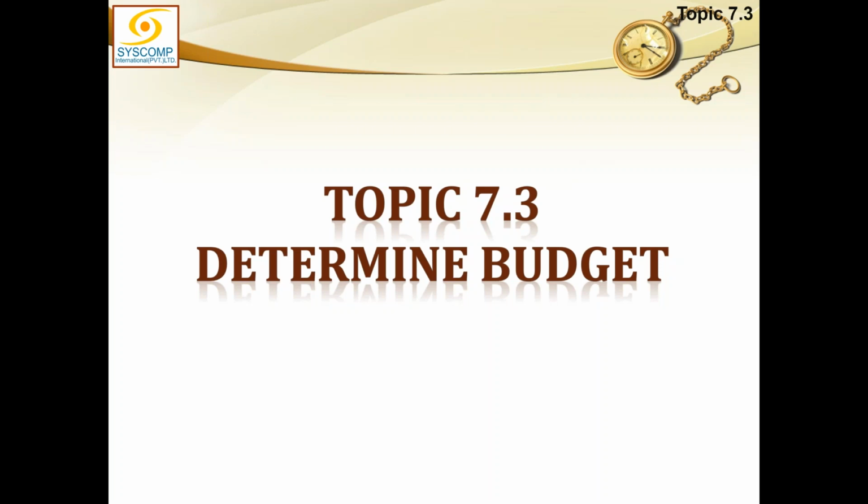We said why? So their answer was that we have been involved in many construction activities, and the parametric estimate for an office environment is normally based on, say, an amount of 4,000 rupees per square foot, which is a very high amount, but I'm just giving you an example.